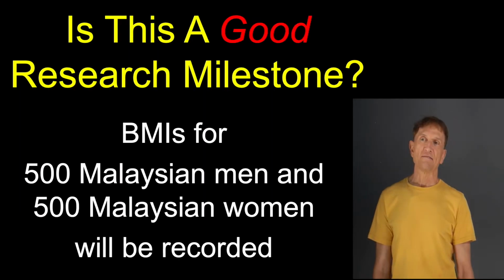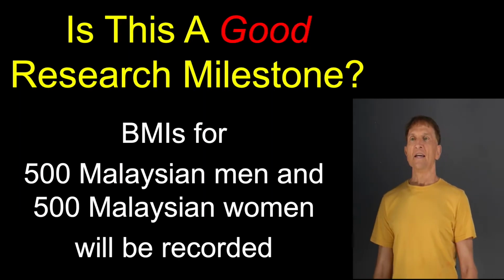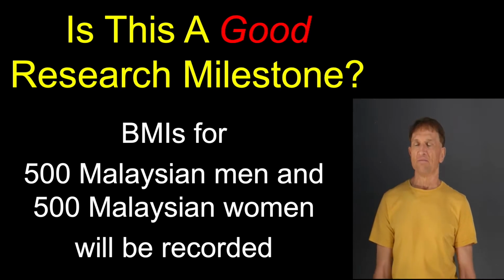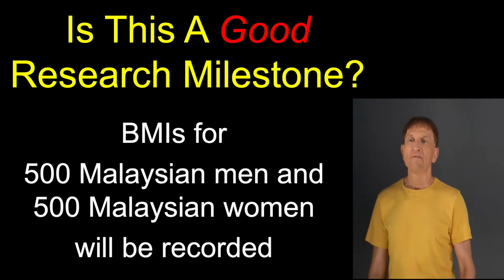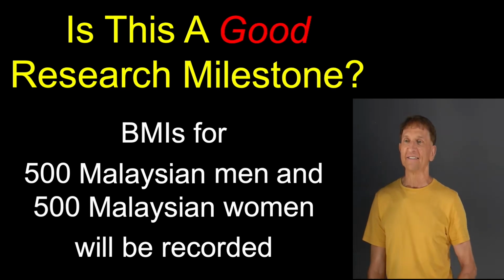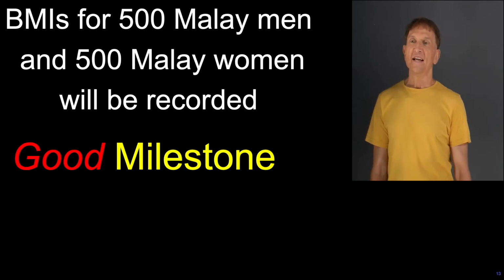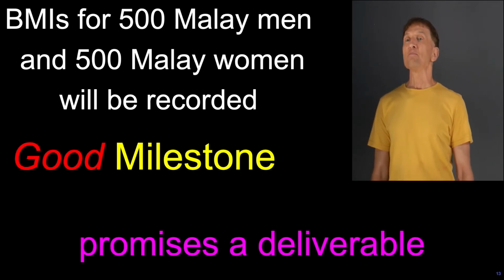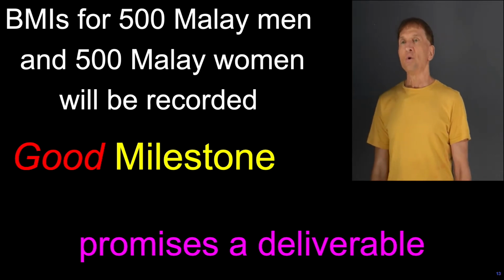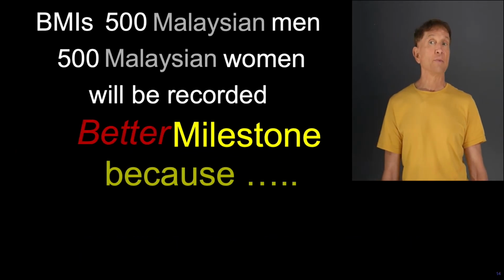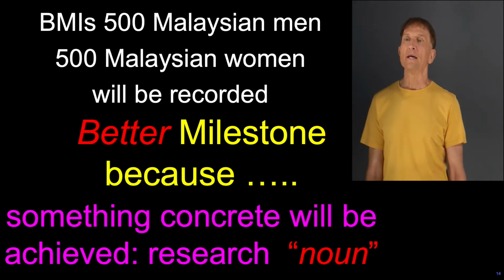So how about this then? This is effort number 2. Is this a good research milestone? BMIs for 500 Malay men and 500 Malay women. We're being specific now, I like that. Will be recorded. It's a good milestone because it promises a deliverable. At the end of this milestone, we will get data on 500 Malay men and 500 Malay women.